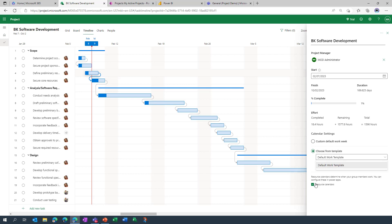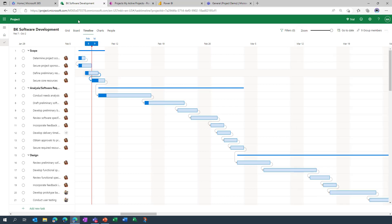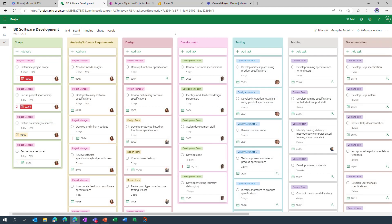So that could either be a calendar that's been specified for the organization generally, or for this particular project you might want to apply something that's a bit bespoke and that is also possible. Something that I am not going to be able to demonstrate today is the ability to also go in and apply individual or resource specific calendars, because you might have people that are working part-time and you want to reflect that when they are being assigned across tasks. But closing out of this I'm going to jump across now to the board view, which of course is what you will want to see after all. This is a showcase of some of the agile capability inside of project for the web.